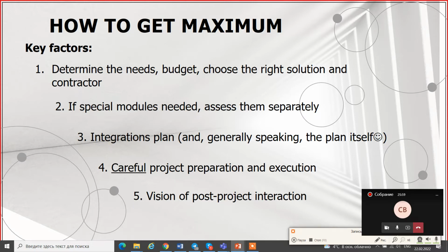Yes, I forgot to say. When you speak about the return on investment, and the IT implementation is also return on investment, of course, because it's an investment project, there are two main approaches to estimate the efficiency of implementation of every IT solution. I don't speak only about LIS, I speak about every IT solution. First of all, it's the empirical approach. You assemble the statistics, or you take the statistics as already assembled, of how exactly your colleagues with comparable productions have benefited